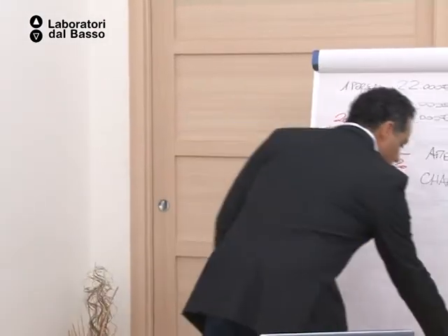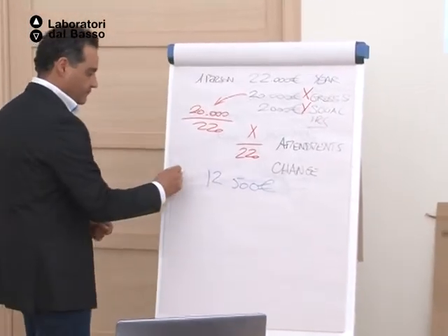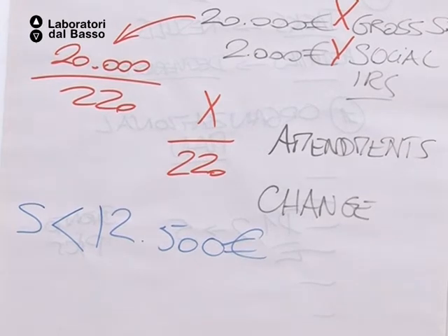There are rules on procurement according to the amount of subcontracting. I don't know if I have it. Yeah, I have it here after that. If you subcontract less than 1,205, you must have a minimum of justification, which is the invoice. If you subcontract translation for 8,000 euros, you will have a contract defining exactly what you've been asking of the person or organization who will subcontract, and then you will have an invoice from this person or organization.